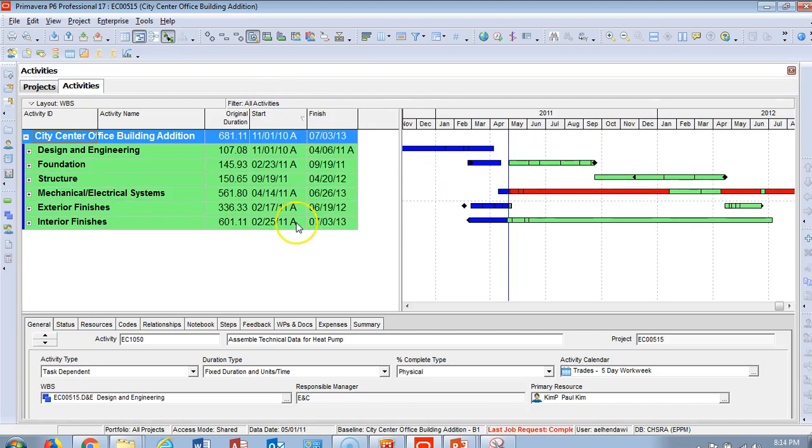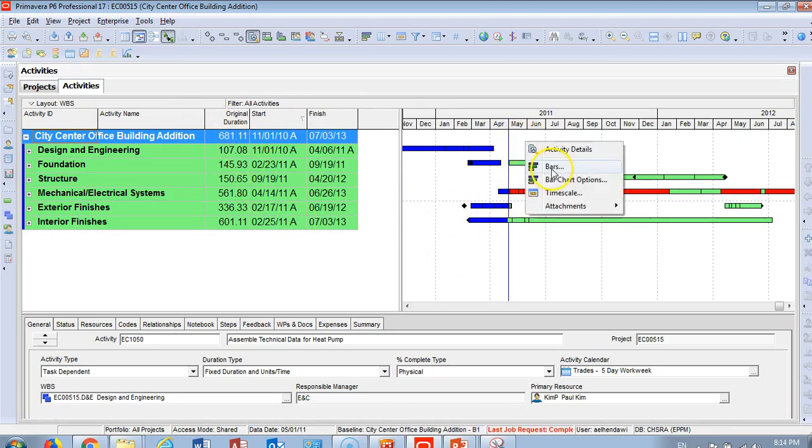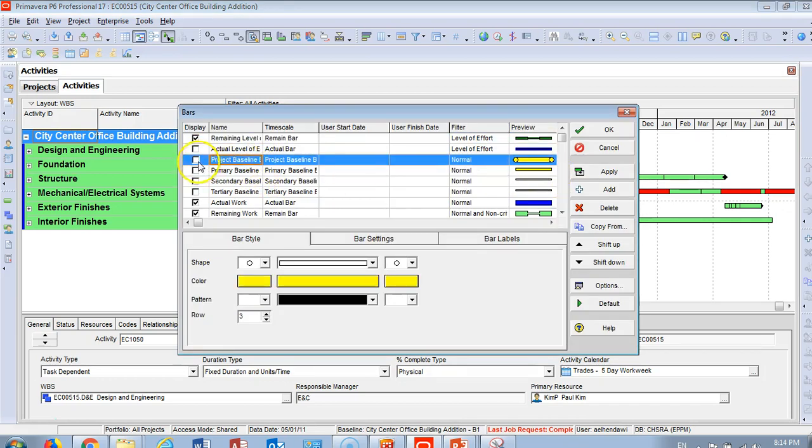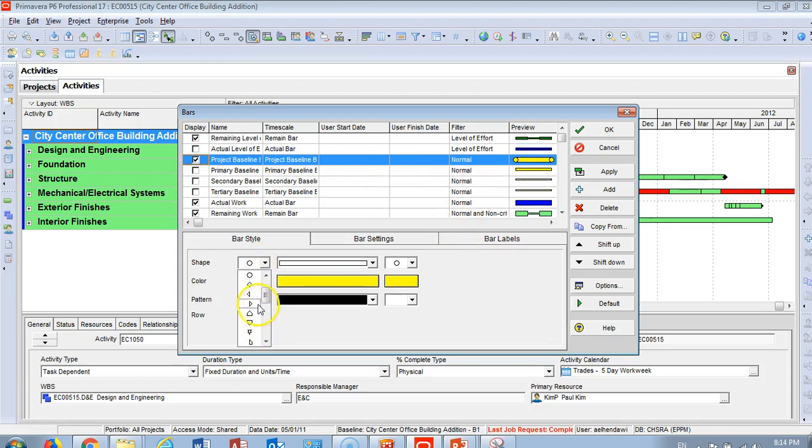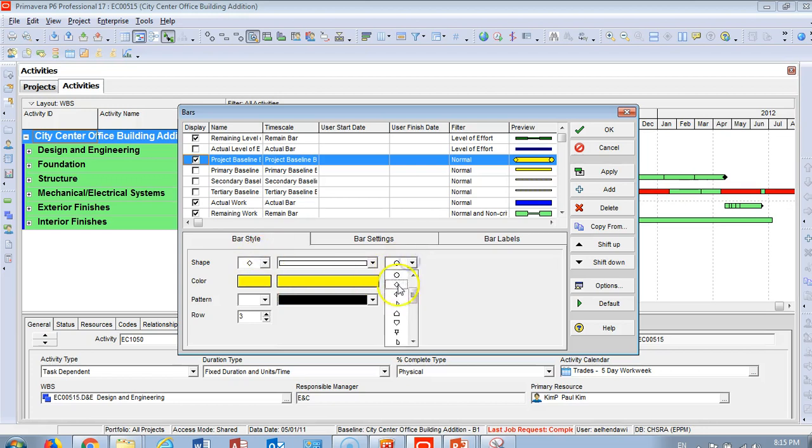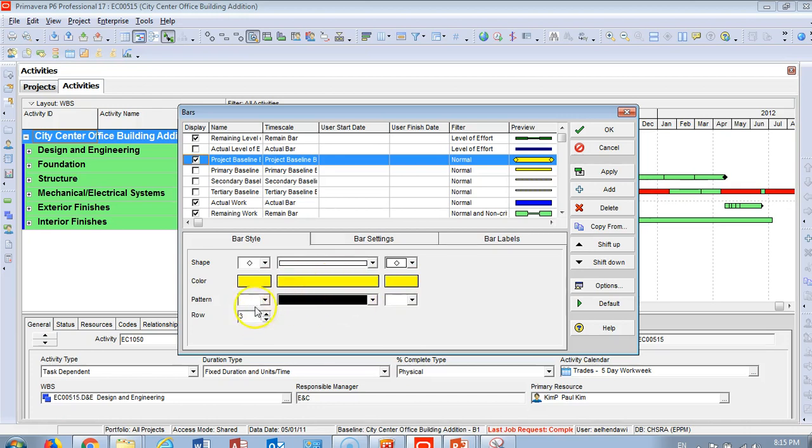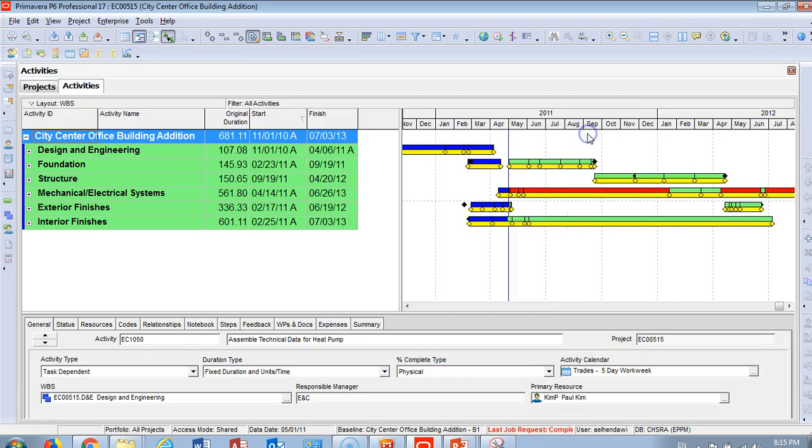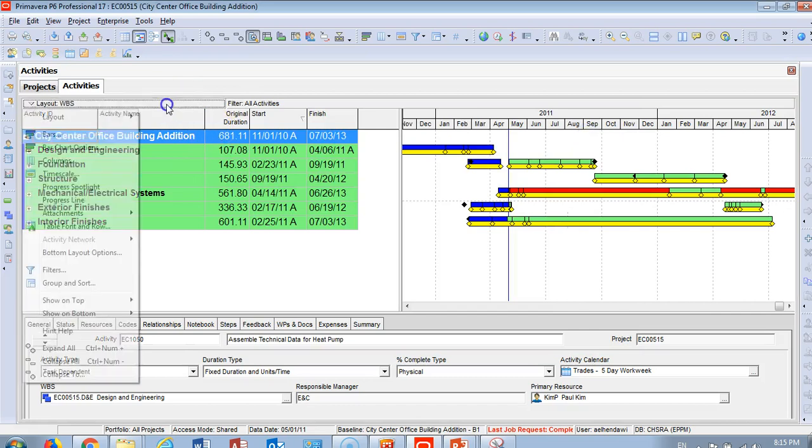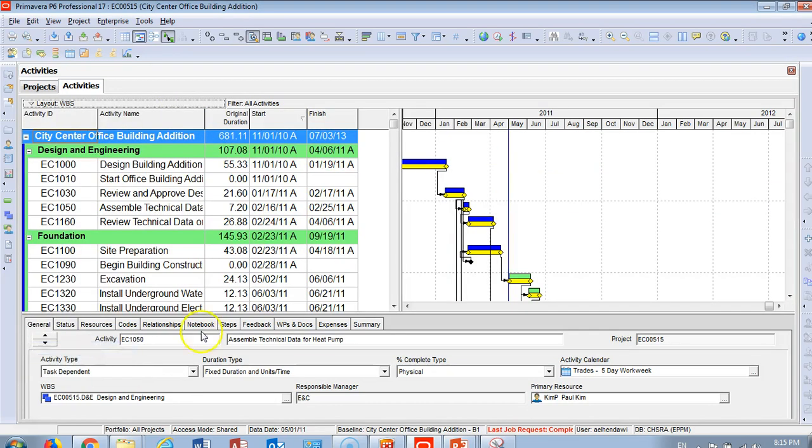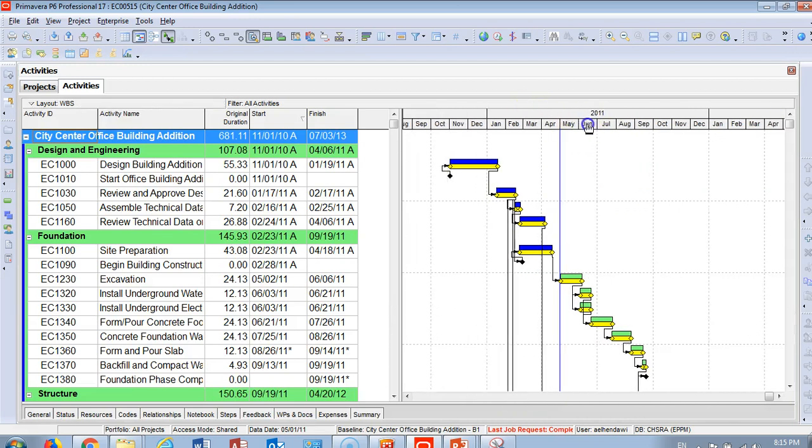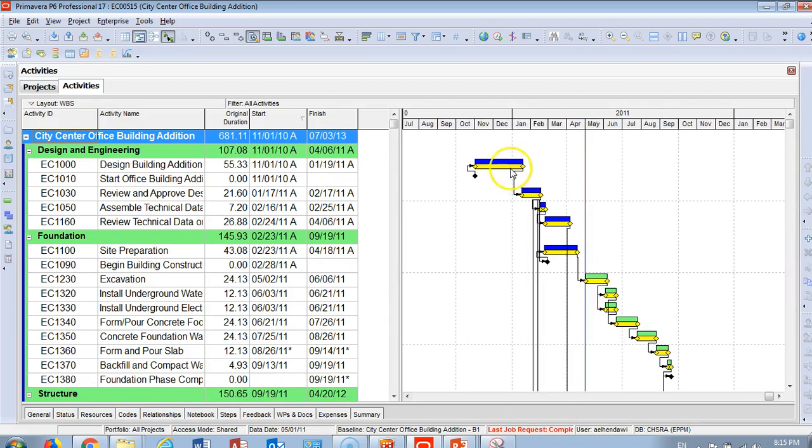Why can't I see the baseline? What's the next step? Go to right-click Bars and go to Project Baseline. Choose this one here. I'm going to make the start like that and the start like that. I'll take this color and keep it solid. I'll say Apply, then open the schedule. Expand it, and you can see now—here's the baseline.